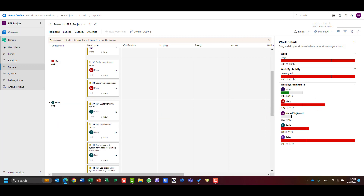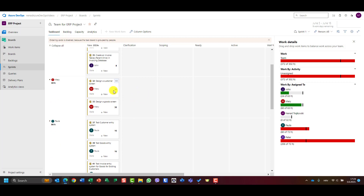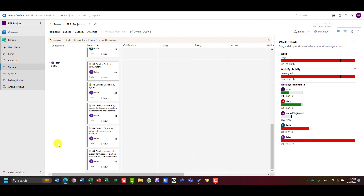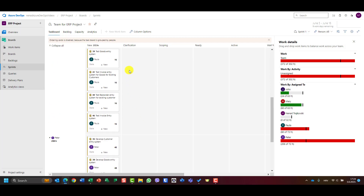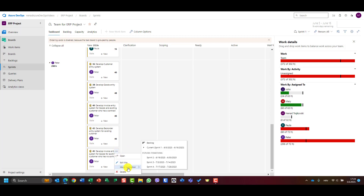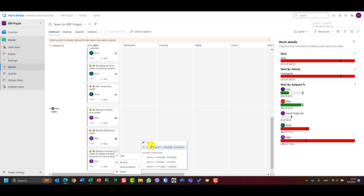You cannot see anything here before you refresh. I will refresh the screen and now Mary is good. Since Mary is going to design a customer screen and goods screen, and because we moved Mary's tasks out, the related development tasks for Peter should also be removed. So let's remove invoice entry screen, backorder entry, and invoice entry system for goods for existing customer contracts from the sprint — move to iteration, to backlog — since design is not finished for those.